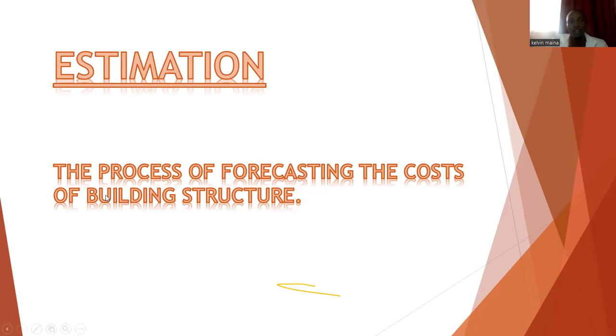So in short, we are saying it is the process of forecasting the cost of a building structure. You divide all the building elements into smaller items, then you cost each one by one, including the materials and also the labor associated with the cost of the elements.